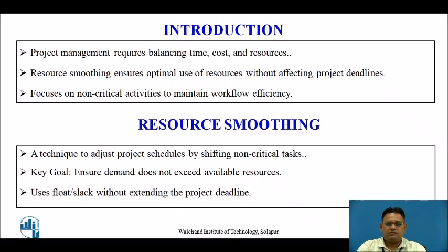Let's see what resource smoothing is. A technique to adjust a project schedule by shifting the non-critical tasks, or you can say activities, with the utilization of the floats associated with the non-critical activities.